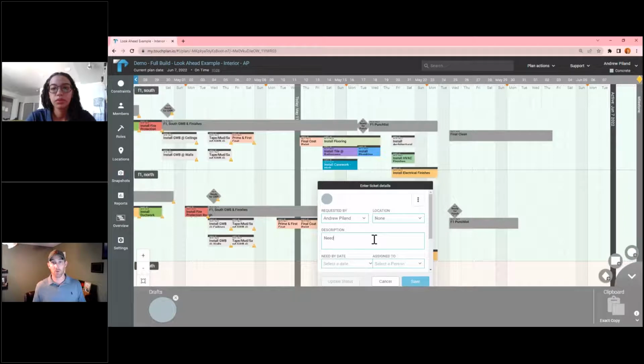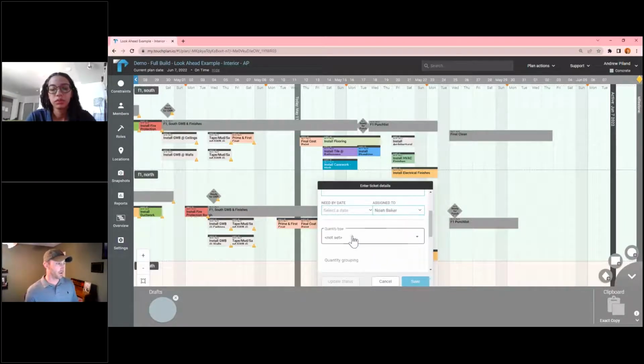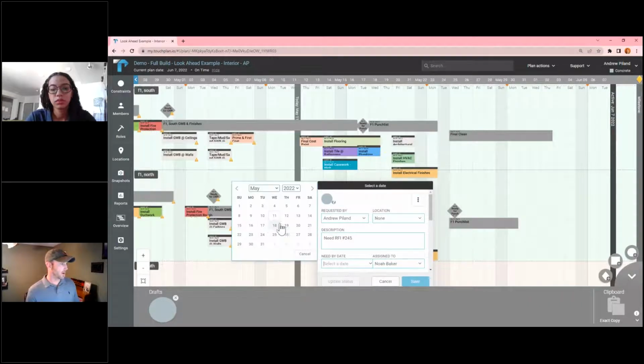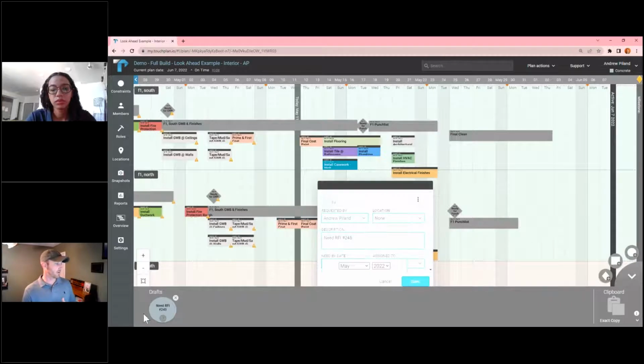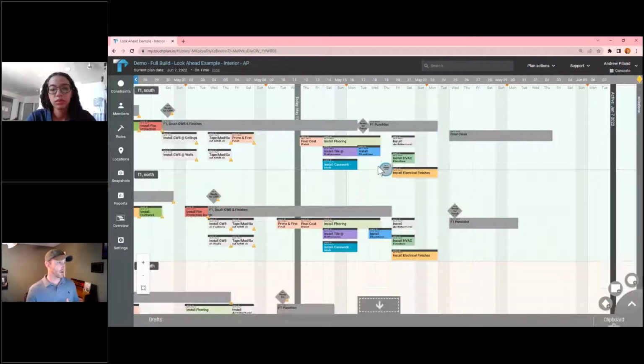I need you to help me push this through the engineer very quickly, because otherwise we're going to push out the entire schedule. So I'll have an RFI number assigned, I'll assign it to Talia, and I'll give it a very specific need by date, save. I'll drop it in here.